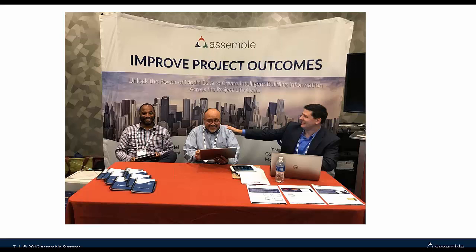That's exciting stuff. And then I'll say, before Curtis speaks for a second, from my point of view, working with Curtis in the past, he was pushing some interesting stuff on one of their projects where we were tracking installation dates in the field, but his superintendents had to highlight things on the plans, send him photos of what was installed, and then back in the office he was plugging those dates in to track production information and that sort of thing. So I think this for his group is particularly exciting because that eliminates all of that manual process.